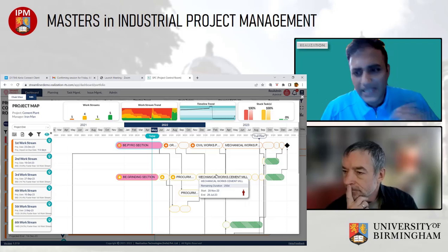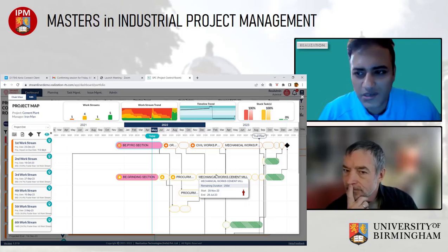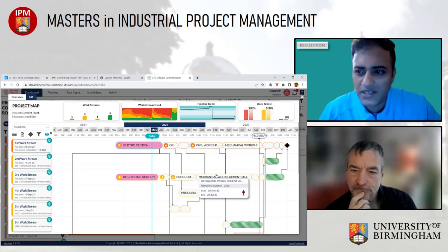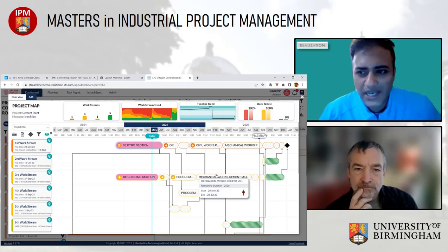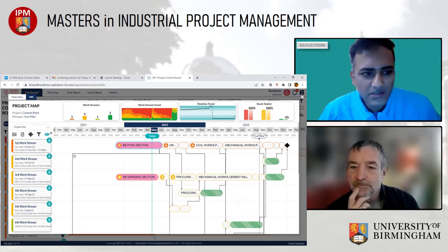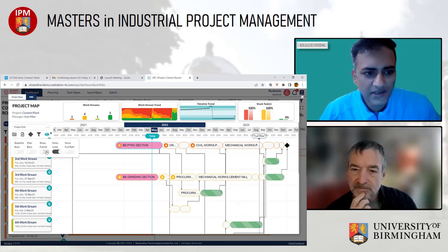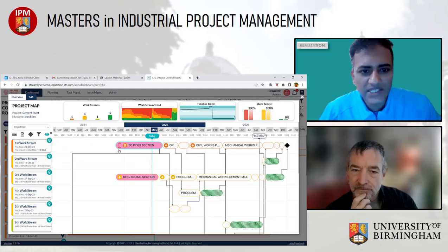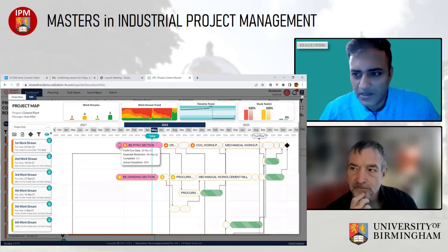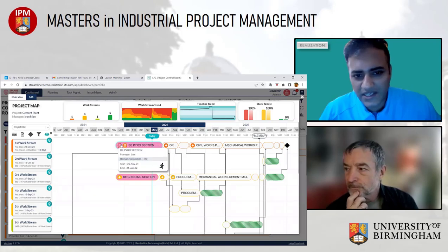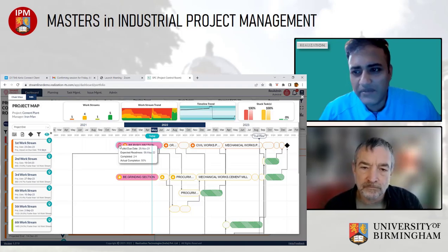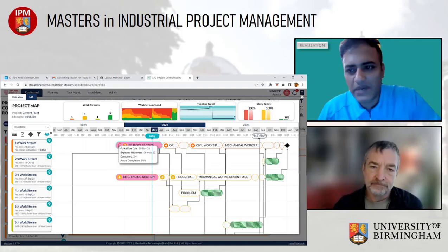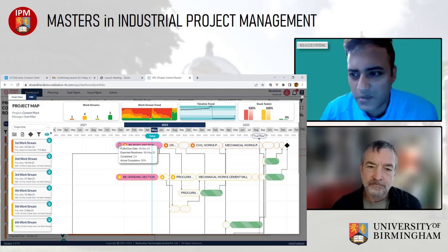So that is one. Then comes things I only get to know when I get closer to the job. So when I'm 1 month before or 2 months before, I get to know of real ground realities, and I should be mitigating those risks. So for that, there is the full kit. I can do a show full kit, which brings out this battery sign. And this is basically the list for this box, what are the things I need to take care of before I start this, in addition to the dependencies which are there, that will prevent further problems from coming up.